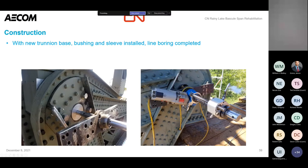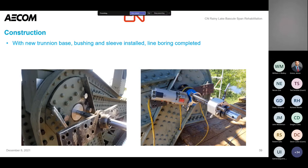Once fabricated, the new base is installed, then the bronze bushing goes in, then the steel sleeve with the big hole, and then the pin. Everything needs to be perfectly aligned for the interference fit. They actually leave some extra material on all elements, put them in place, and then come in and do what's called a line boring operation — drilling the final hole diameter in place with everything installed. This was one of the few things where they did need a rail closure for a number of hours, since we don't want the span moving while doing very precise boring. This line typically only saw a few trains a day, so that wasn't too difficult to coordinate.